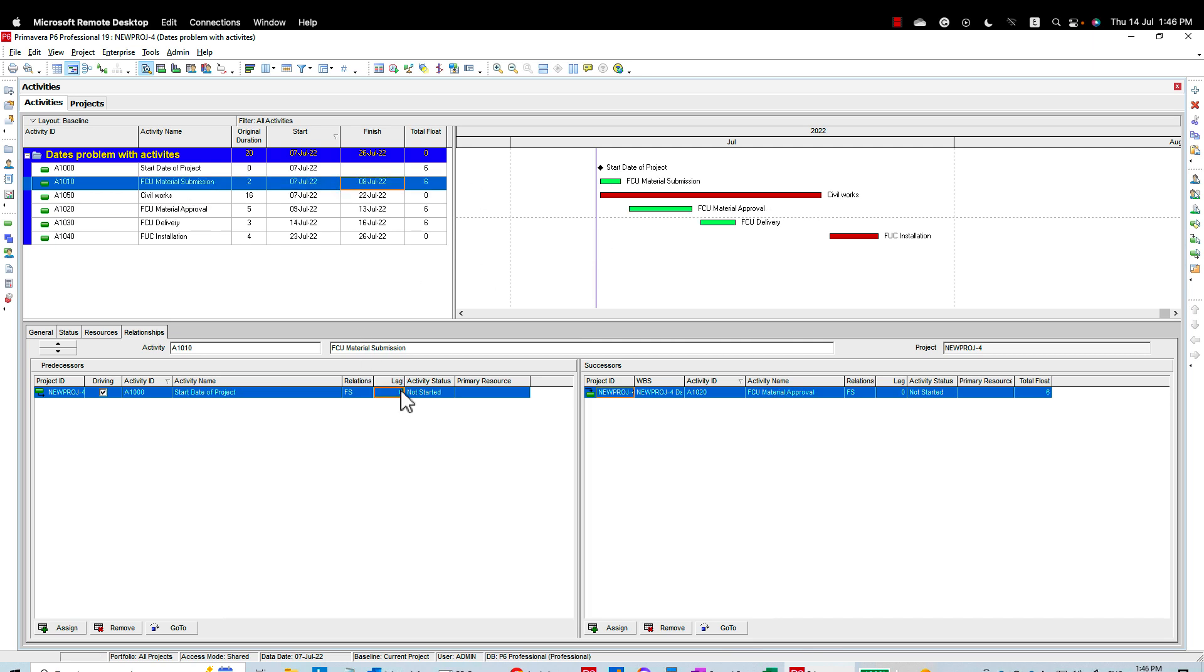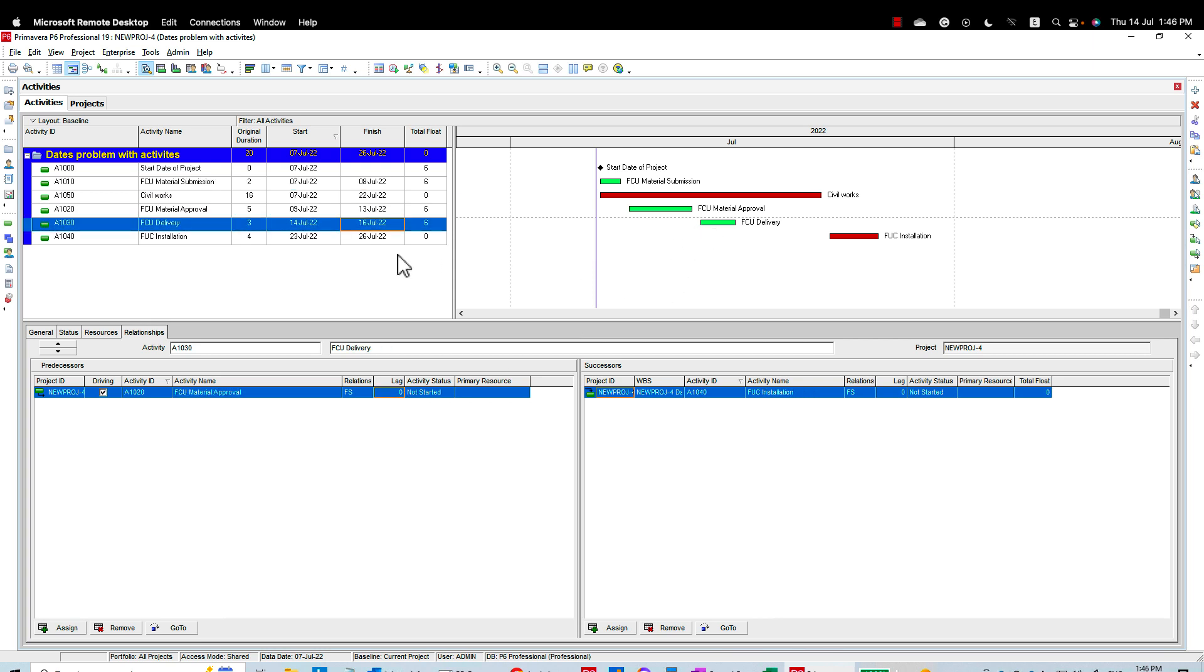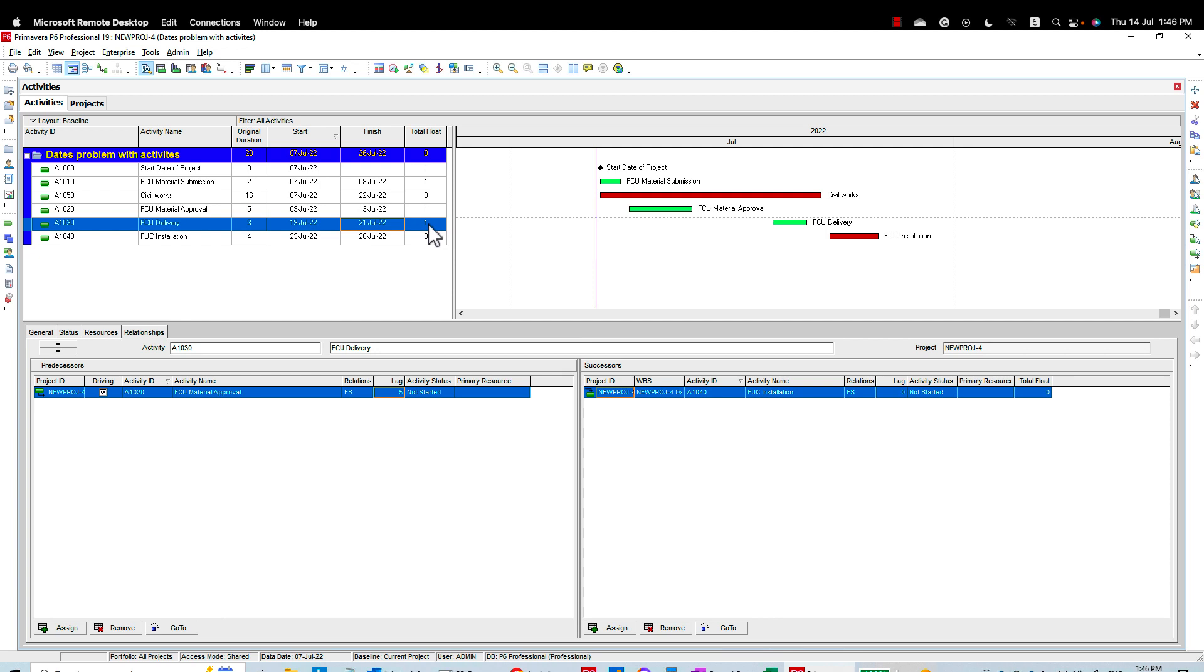So the second thing or the second scenario, I'm going to keep this as is. Now I'll go to the material delivery. Now I have my material submitted and approved, then I can delay the procurement a little bit, let's say by five days. In that case, okay, I am on the safer side than the previous scenario. I still have the one day float and the material procurement will start and end just on time. But this is also not my preferred method.